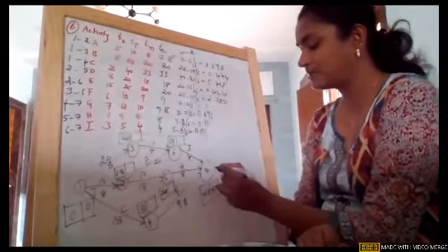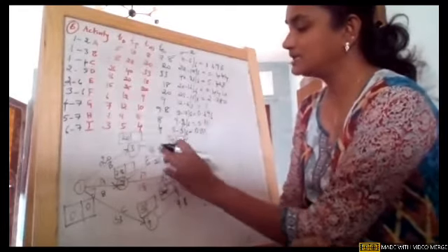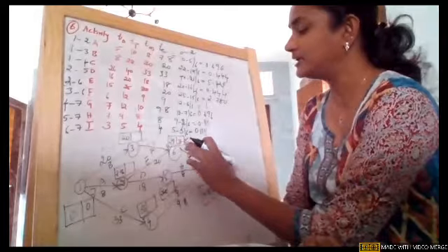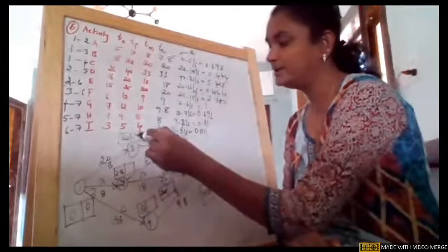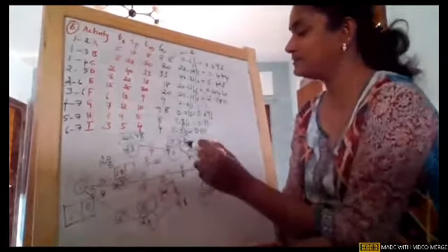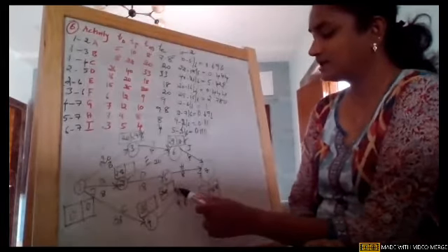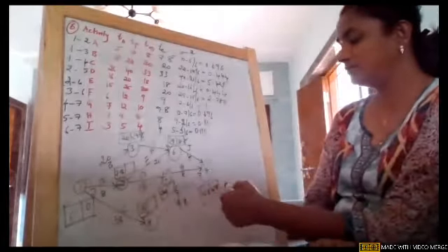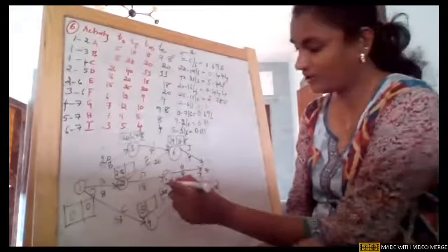So similarly, go reverse. When we go reverse, 42.8 minus 4 is 38.8. Then come again near node 3, we have a single arrowhead, 38.8 minus 9, which gives us 29.8. So this is one path which is done. Come to node 2, there are two tails. First we'll come for one tail, we need node 5 duration. So 42.8 minus 8 gives us 34.8.